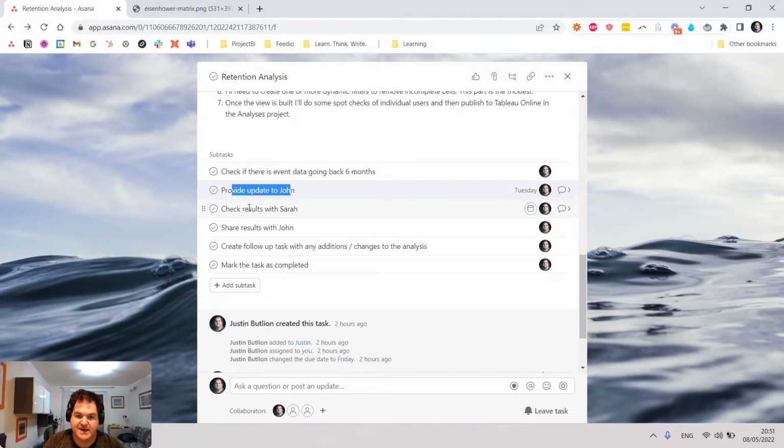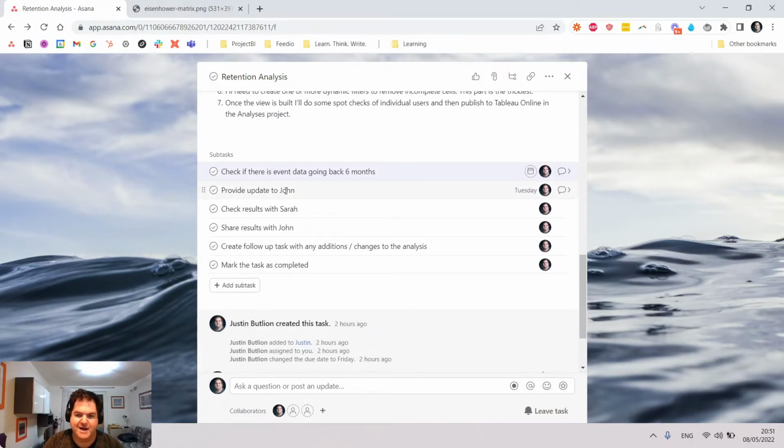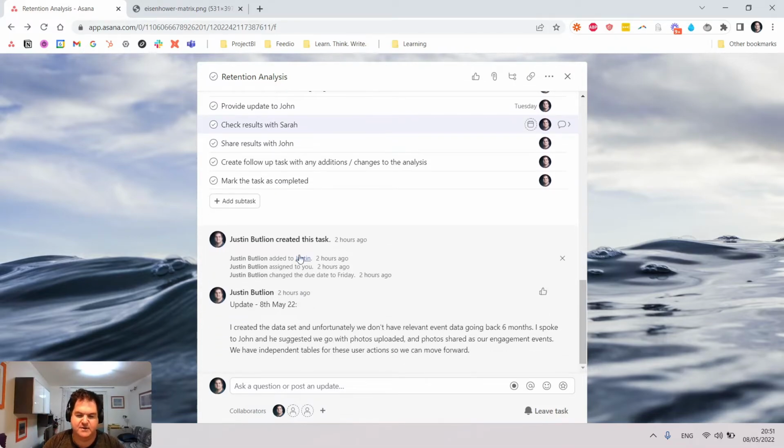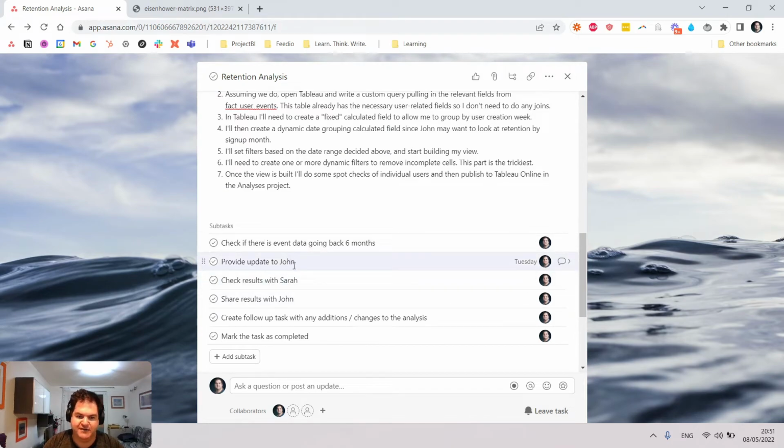We're going to then provide an update to John. So communication is really, really important here. Just make sure you're continuously updating the person that requested the work, so he isn't left hanging. If he knows it's going to take a week, then after 3 or 4 days, just send him a quick message. I'm on it. I'm working on the deliverable now, and we're on schedule.